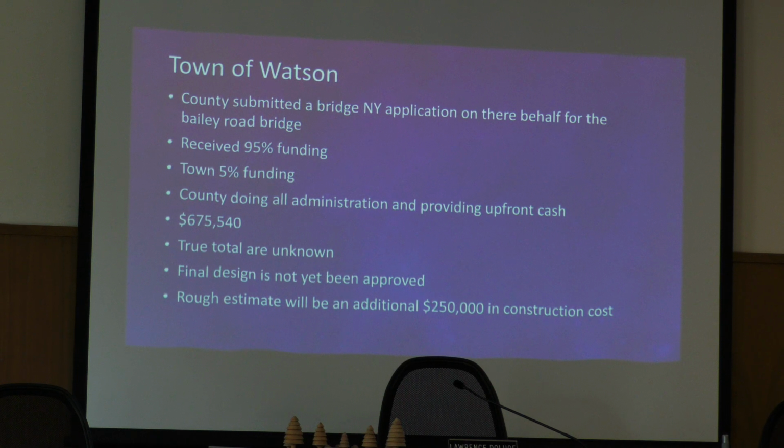But they did. And so, obviously, Town of Watson says, great, it's free funding, we'll do it. And yeah, the Otter Creek Horse Trail system is good for our community, and we have no problem doing that. However, now that there's a $250,000 delta, and the state says, we're out, we're giving you $675,000, you figure it out, they don't want to pay that $250,000.